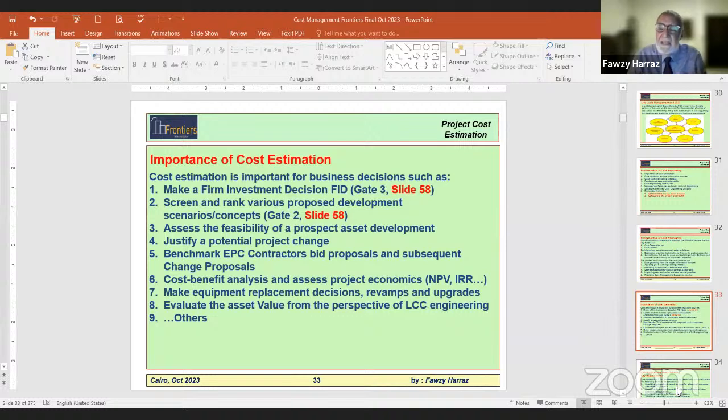You will definitely find some odd figures in the 3. You mark these odd figures, and then you go down the list. The list, as I said, will be pages and pages of numbers. So you will have a judgment that one of the EPC contractors did not do the exercise properly. And if that happens to be the cheapest price, you will have really a big concern to the management that the bidder is underpriced. And this could be one of 2 serious problems.